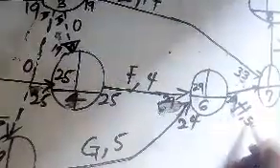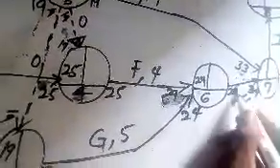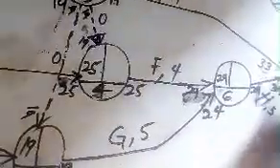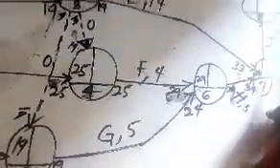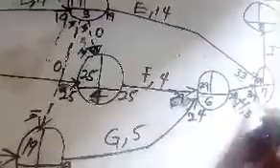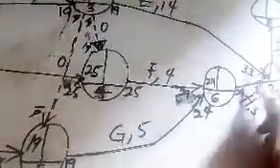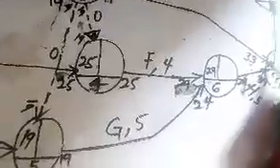29 plus 5, that is 34. So I have my 34 here. Don't mind my writing on the board, very small like that. So 29 plus 5, 34. So you can see my 34 is greater than my 33. I put my 34 inside. Don't mind the writing, very small, sorry. So my 34 is greater than my 33. So my 34 is larger. The activity duration is larger. So I have 34 in here.